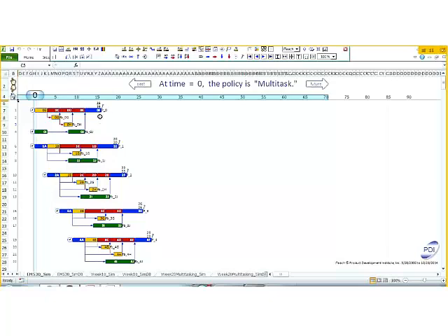So here's each of these projects, and what we've done is staggered the projects for commitment dates based on the release of this system engineering resource. You can see when the system engineering resource is released from project 0, it's planned to immediately start on project 1, and we just cascade on down through. And we've made these commitments. There's a little nail at the apparent end of each of these projects, and that nail is our commitment to our customers. So the commitment for project 0 is at week 16, project 1 week 20, project 2 week 22, and so on.